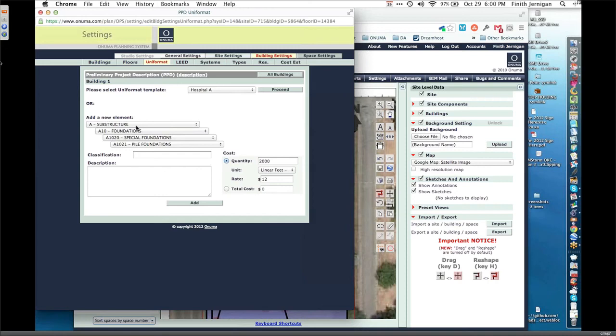But the reason this is in here is not to do it manually. The reason this is in here is to connect to outside systems such as dProfiler, Beck Technologies' dProfiler. You can take the model that's created within the system that has spaces and all those other things, and you can export it as a BIM XML. dProfiler can take that BIM XML directly, do all of the magic that Beck Technologies does when they do estimating within their system, and they can go up to a very, very high level, or they can do parametric estimating within their system as well.